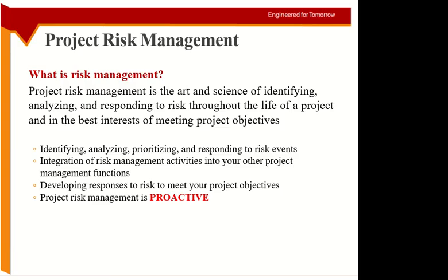Okay, so I have a plan, I have these activities, I need this material, this equipment, this much labor, and then you identify the risks, and whatever risk you identify, you will do the whole process for it. What can happen, and if this happens, how it will affect the project, and then you decide your action in advance. So you are not waiting for when it will happen. No, your action is already in place. So equipment malfunction, the plan is already there. Now you know who to call, how to do it, and so on and so forth.